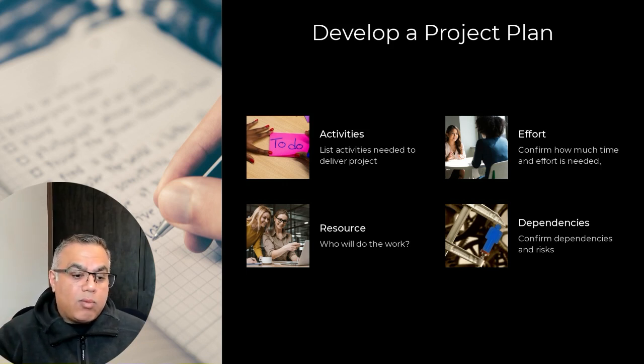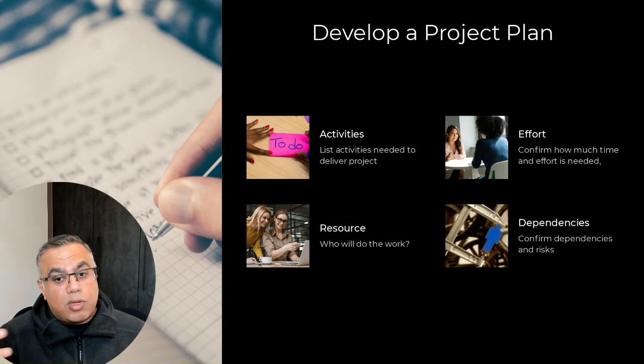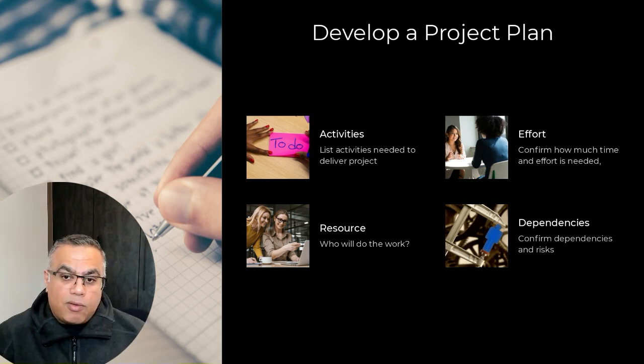However, the overall plan will give you some clear indication of whether you're going to meet your deadline or not, and if there's issues, how you can best manage things. It also helps you look ahead, which is really key. Remember the end in sight. If the project plan is fully completed as best as you can, don't forget, your plan will change as it goes along, but having something as a baseline will help you get there. For your project plan, it's really key understanding the activities, how much time and effort, who will do it, and when it will happen, and any dependencies against each activity.